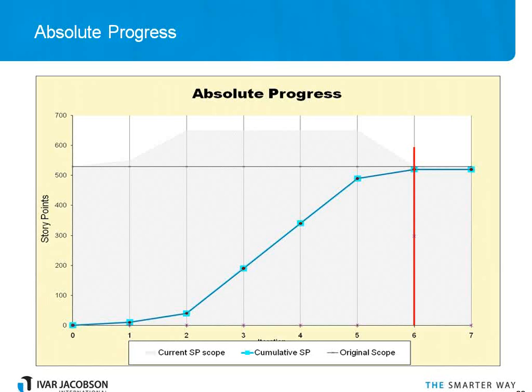Okay, and I find that personally a little disturbing, going negative. But also, just the burn ups to me has more feeling of achievement. But it's up to you which way up you have the graphs. You can see here that if we had our S-curve and we were tracking after iteration number 4, we would maybe have thought, actually, if we keep going at this speed, we're going to be able to make the full scope. But then it becomes apparent that this isn't going to happen, so we can look at the descoping.